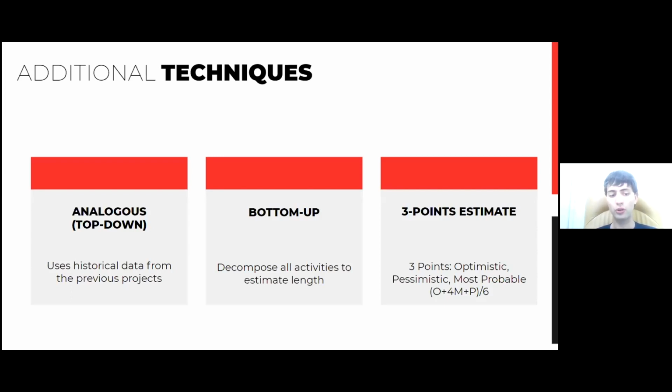So each of the tasks that team will estimate in the future should be something like 1 or 2 days, but no more than 4 days long, because with bigger tasks in the task list during the estimate, we can get more discrepancies, and in the end, we will not get a precise estimate as we want to. So we need to drill down into details as low details as possible to get the full list.